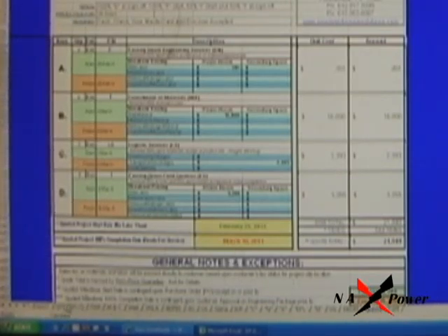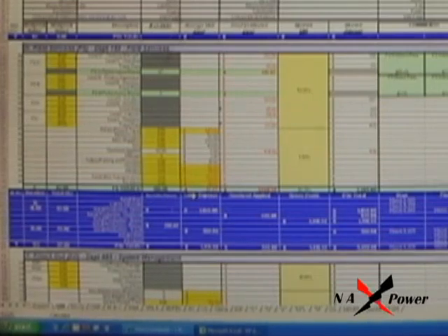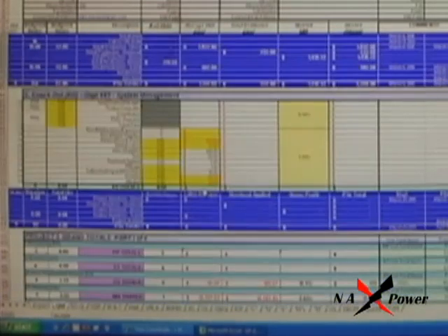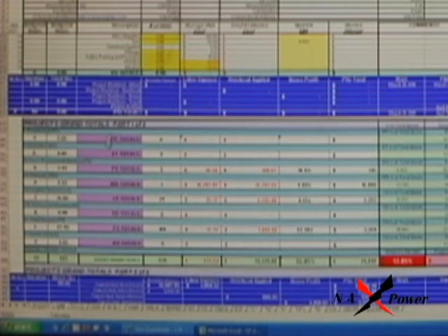You then can go into the QW if you really want to drill down into some gory detail. And you can scroll down to the very bottom and see how all this project is rolled up. In this particular case, this project defaulted to a 12.85 margin, which is very low. The field service margin is typically around 50 points, which in this particular job is right now at 43.38.